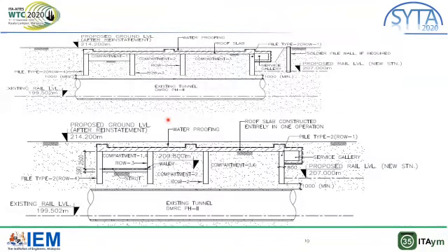This is a figure showing the excavation in compartment 1 and compartment 4. Also, it shows the installation of strut. Here you can see that first, we have to complete the excavation and base slab activity in compartment 1 and 4. Then we have to follow the same sequence and complete the activities like excavation, installation of strut and construction of base slab in compartment 3 and 6. And finally, this is the compartment 2 and 5, which we have to take up at last.